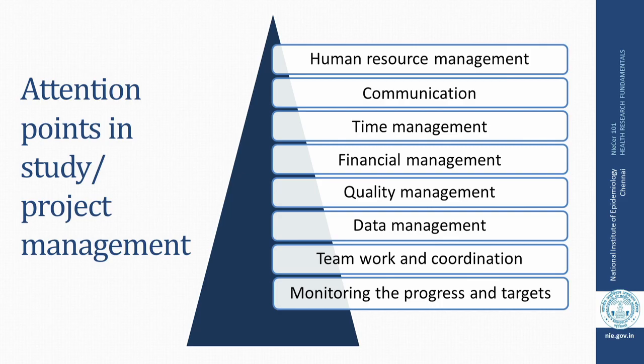Sometimes it so happens that studies start well with the funding being given, but suddenly some kind of glitch develops by which the finances are not granted in a continuous manner. Suddenly the activities of the project stop, and hence this also is an important part of the planning. This has to be planned well in advance, at what stage what kind of money will be released, and it must be ensured by the researchers that the targets which are defined well in advance are appropriately met, so the financer does not find it difficult to release the money as earlier decided. Quality management at all levels is critical.